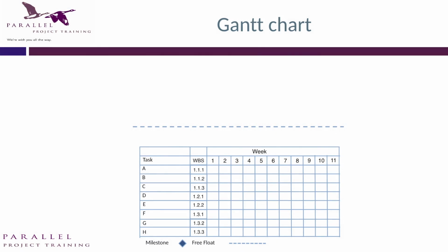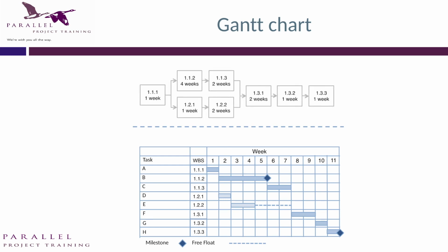So normally we take that information and we map it on a Gantt chart. So this is a Gantt chart here, and you can see the critical path is the path at the top, and you can see that there's float on the bottom path. And you can see there's 3 weeks, 3 bars of float shown on the bottom path. And usually most people are familiar with critical path Gantt charts like this, but they maybe don't realise that behind the Gantt chart is sitting that precedence diagram, and it's driven by that precedence diagram.